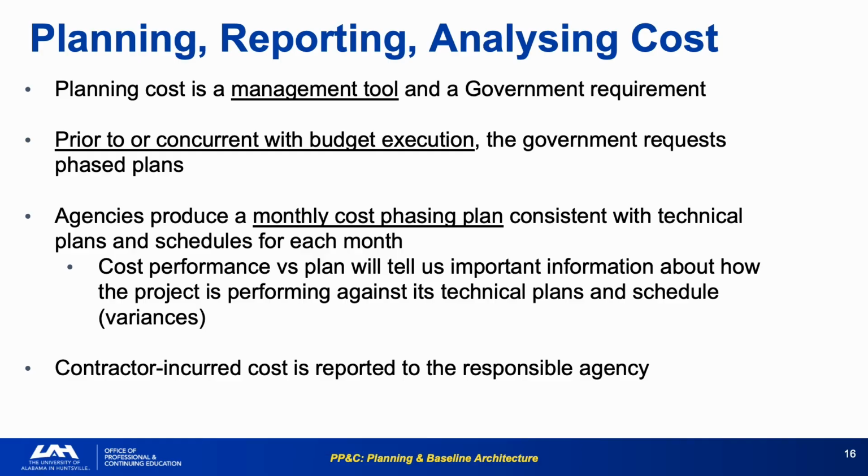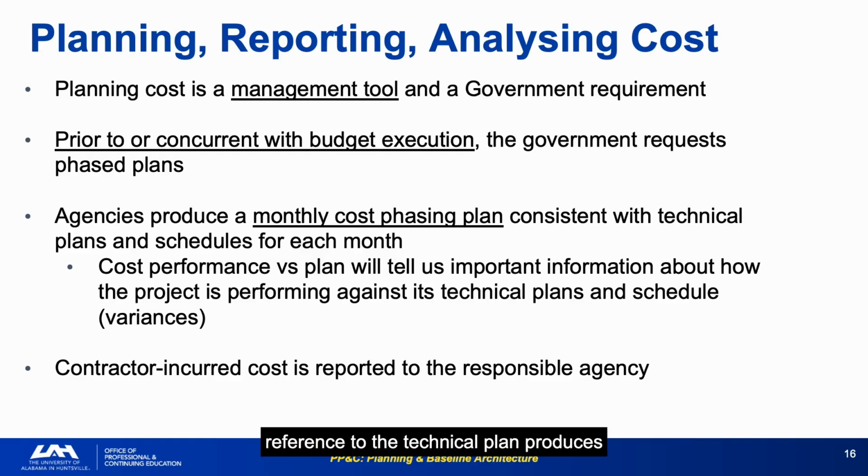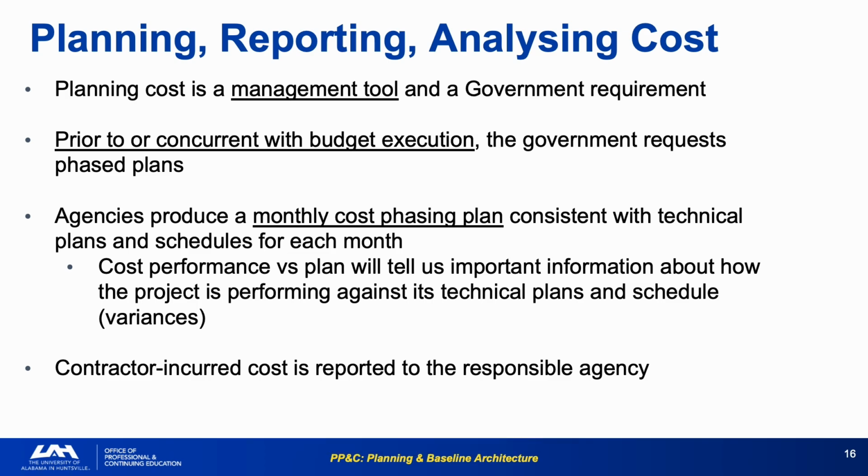Analyzing cost without reference to the technical plan produces misleading assessments. A program that is 10% under cost, but also 20% behind its technical plan is not performing well. It is just spending money more slowly than anticipated while falling behind on deliverables.